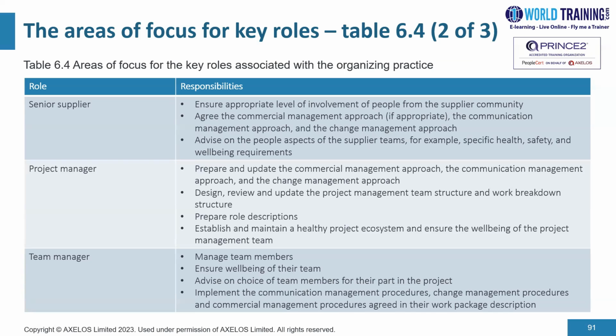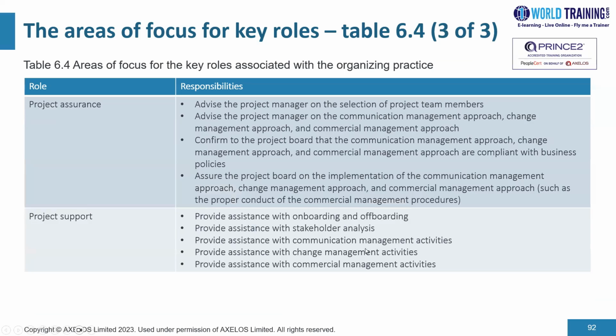When it comes to the project assurance role, the assurance role would advise the PM on the selection of the project team members, and would advise the project manager on the comms management approach, the change management approach, and the commercial management approach. It would confirm to the board that the comms management approach, the change management approach, and the commercial management approach are compliant with business policies, and would assure the board on the implementation of the various approaches, such as the proper conduct of the